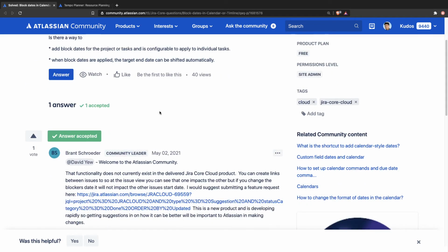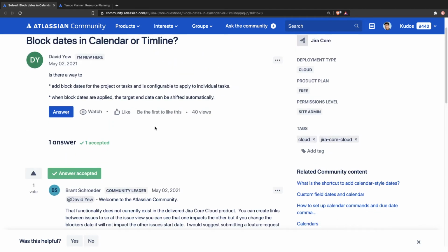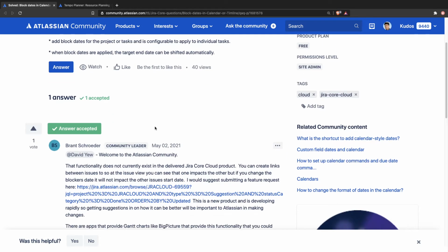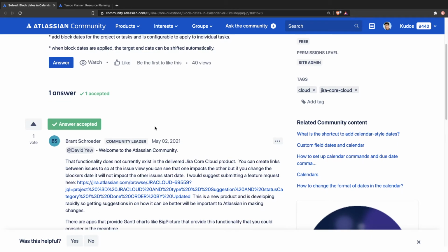There was this feature of individual capacities and non-working days when you were using the old Jira Align Plan and Portfolio, but not really in the new improved interface. However, if you're using individual boards, then you do have those non-working days that can potentially be used. But of course, Jira won't really stop you from allocating work on those non-working days.